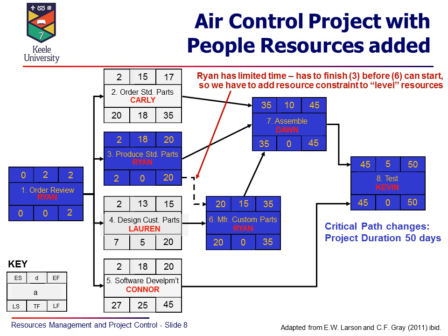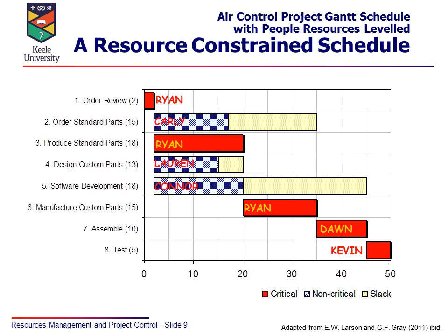the network diagram that you see there, and we can also represent the same thing on the Gantt chart. You can always just write in the resources, the names, and this again shows that the early start time for activity 6 is now pushed back with a resource constraint to day 20, with an overall time of 50. So a similar representation.